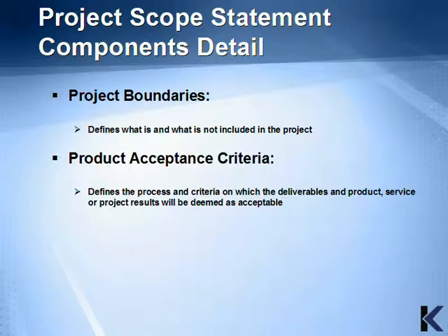In the last section, we began describing the components of the project scope statement. We will complete these descriptions in this section. Project boundaries is a good section for describing definitively what is not in scope. Sometimes, stakeholders may talk about an upgrade or an enhancement that does not really meet the project's objectives, but before you know it, they expect it to be one of the project results. This may be something that must be excluded due to budget or time and should be noted in the project scope document to make it clear that the project results will not include this item.